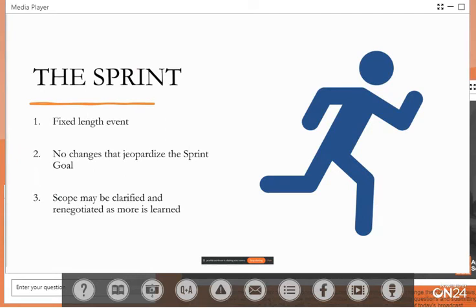And that kind of leads to the third point, which is that a lot of times as we get into things, and here's an actual example that I've got for you. I was building a family library for a customer a couple of weeks ago, and I was exporting out a type catalog in Revit for hundreds of types for these families. And it turns out there's a parameter that doesn't export correctly when you use the export function in Revit. I had no idea that was the problem until the customer was going through the types, and there's this one parameter that was breaking. So in that case, that's a scope change, right?